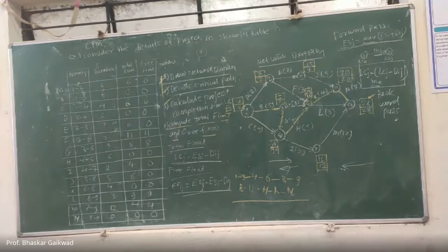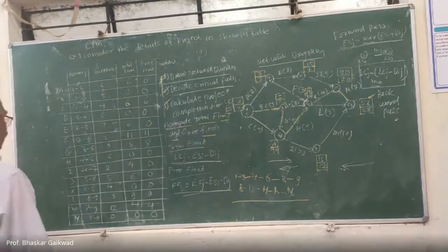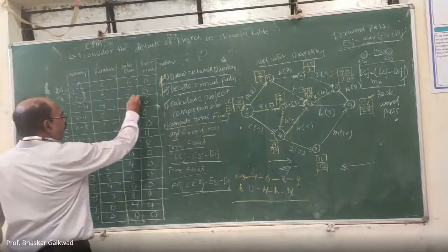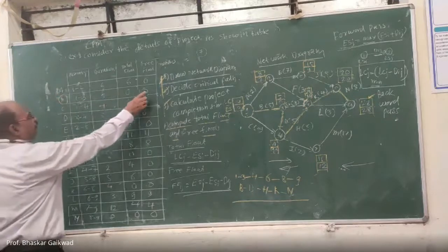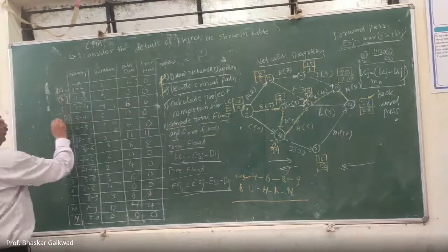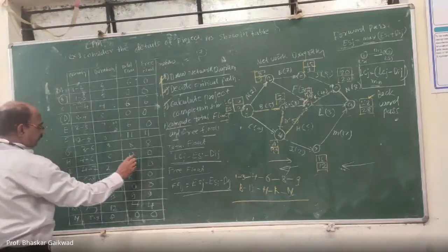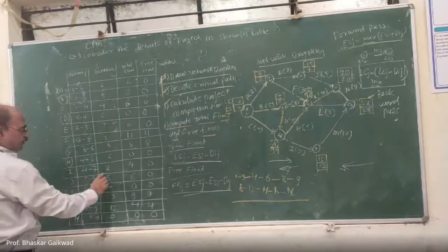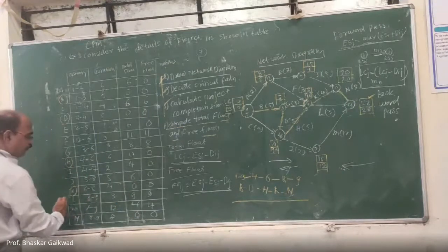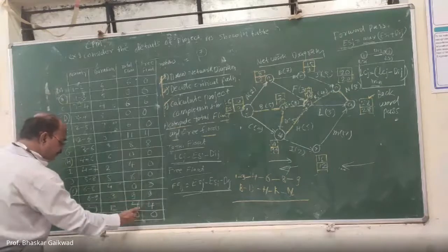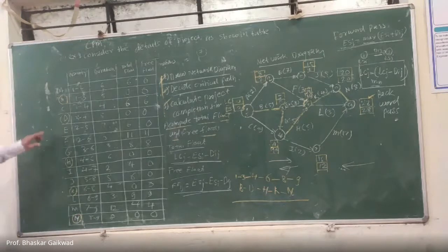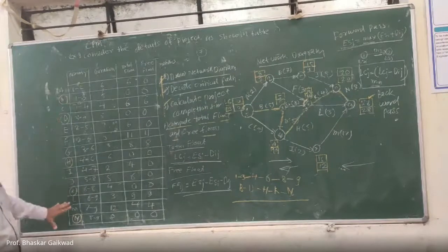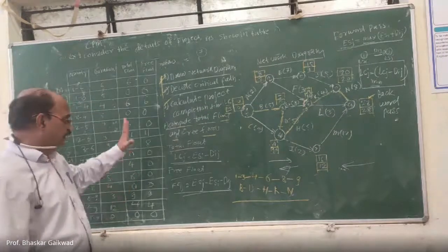Only one thing you have to remember here. Whenever total float and free float are equal, then you can mark like this way. So here it is 0, 0. Here it is 0, 0. So here it is 0, 0, yes. Here K is 0, 0. And last one, N is 0, 0. So here B, D, H, K, N.